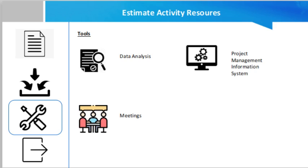The other tool is meetings — the project manager may hold planning meetings with functional managers to estimate the resources needed per activity, level of effort, skill level of the team resources, and the quantity of the materials needed.